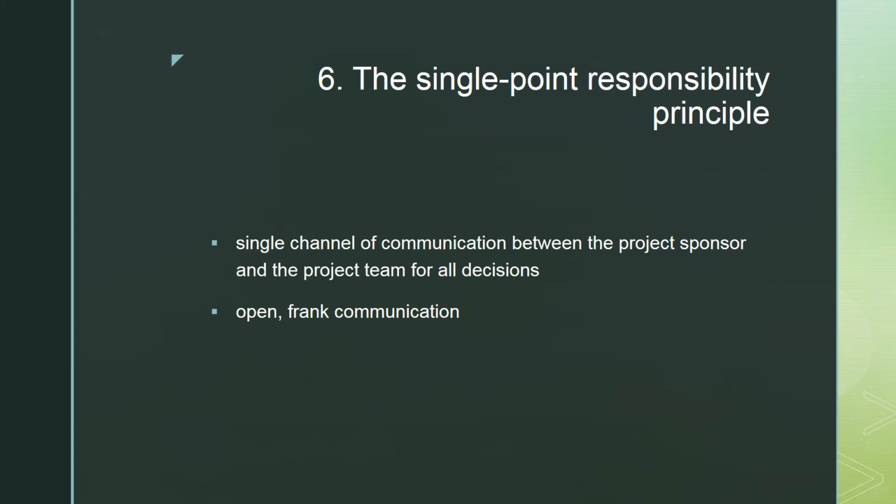Single channel of communication between the project sponsor and the project team for all decisions. There must be that single channel of communication between the project sponsor and project team for all decisions. Now, this helps, number one, save time. Number two, it also helps as far as consistency in messaging is concerned.